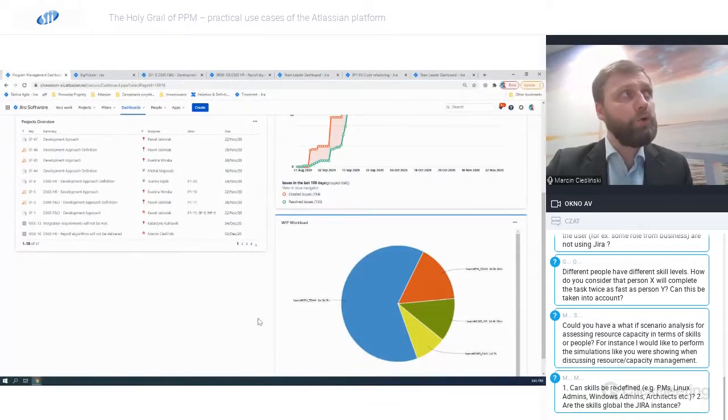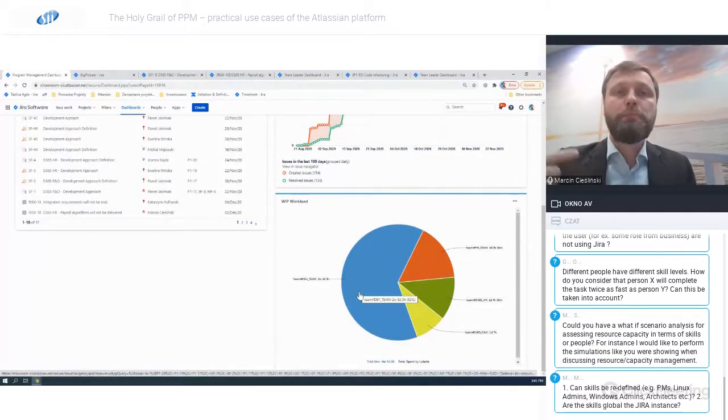Other than that, what I'm also monitoring is the work in process workload. The WIP workload shows me the amount of work reported to issues that have not yet been resolved. So the dev team actually reported 2 weeks, 3 days, and 3 hours of issues, and that reported time has not yet turned into specific value because the issues that they logged their work into have not been resolved yet, right? So that's my work in progress.